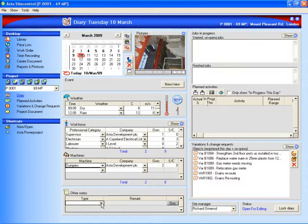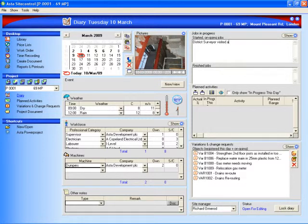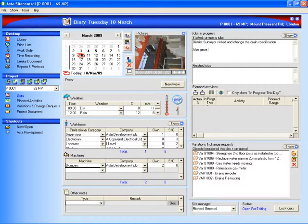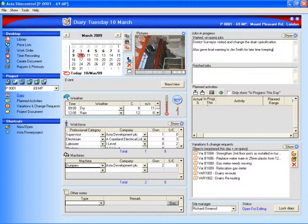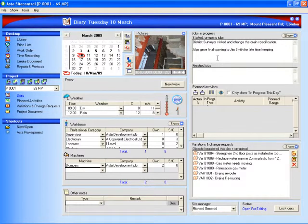But you've also got a number of areas for structured notes and for freeform text in these areas. So we might say that the district surveyor visited and changed the drain specification. So these are the notes that the site manager or the site foreman would normally make in his diary, but now they're recorded in a single place, they're accessible for everybody and they're searchable and we can do things with them. So we've got information that we're holding in this as a narrative and all of that information is vital to record the history as the job progresses.